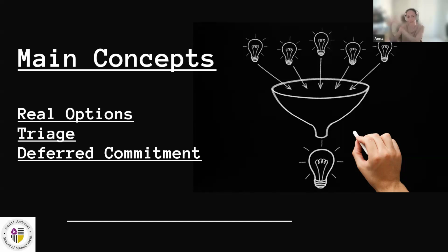Then on the other side of the scale, we have option to discard. That means that together with our client, looking at the data, looking at cost of delay, looking at metrics, looking at current market conditions, anything that can help you to make the decision, you decide together that actually this work item doesn't bring the required value to our business.